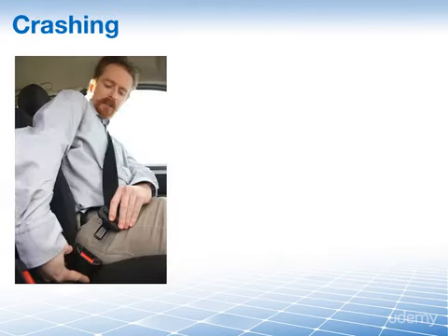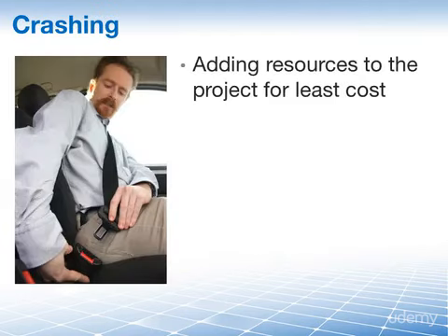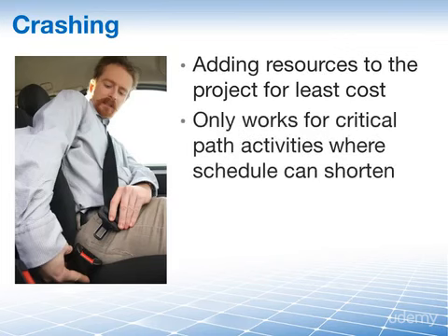Crashing is a schedule compression technique used to shorten the schedule duration for the least incremental cost by adding resources to your project. Crashing only works for those activities that are on the critical path of your project schedule, where additional resources will shorten the activity's duration and therefore shorten the critical path and therefore shorten your project.